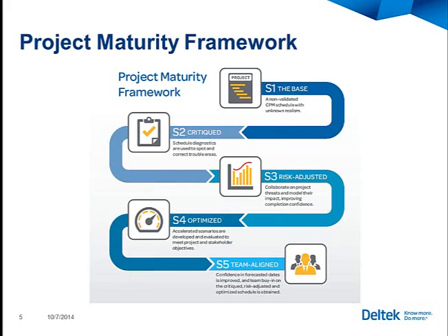One of the sins of my past was starting but also stopping at this S1 phase and not doing the heart of what we're talking about today, which is critiquing the schedule, using system-level diagnostics, using expert human resources to look qualitatively and quantitatively at the schedule to determine if it has trouble areas, where they are, and what the highest priority problems are to solve right now, and what the problems are that can be solved in the schedule over time.